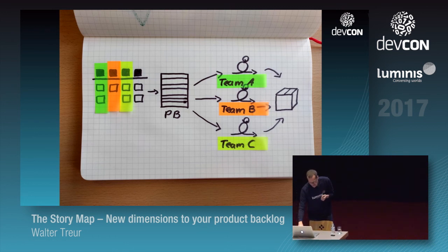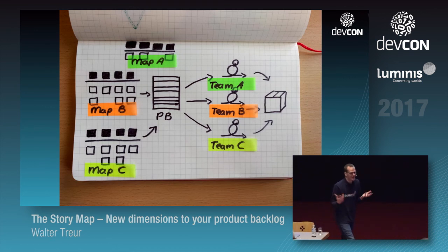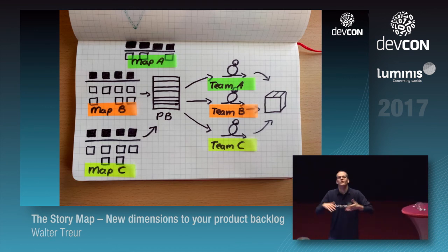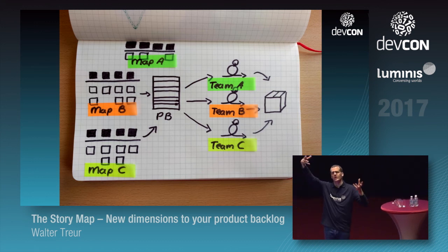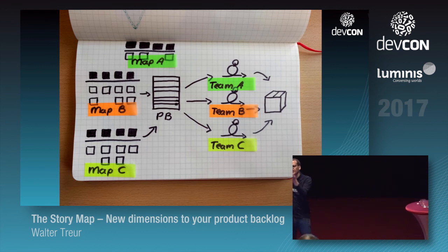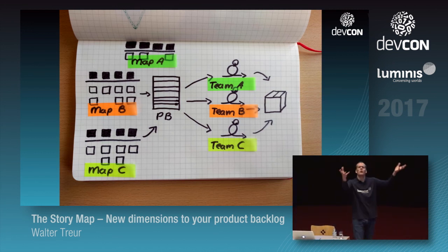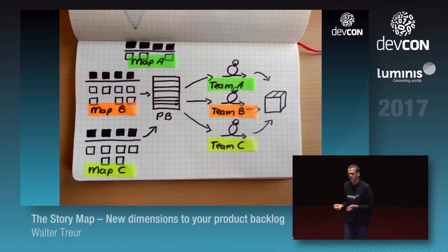But sometimes we have a bit of a larger product, we have multiple user story maps, or perhaps even, when I demonstrated with the hierarchy, the user activity on top that basically are multiple smaller user story maps, you can use that as your feed into your team, saying, okay, the whole mobile application, that's your department. The whole back office system, that's your department. And a user story map allows you to think about the isolation of features, so you can give those to your respective teams and let them work independently of each other.